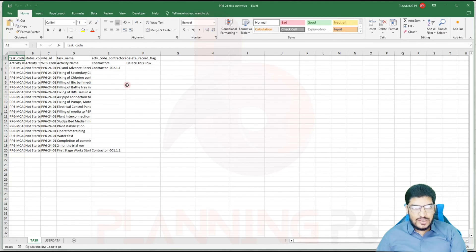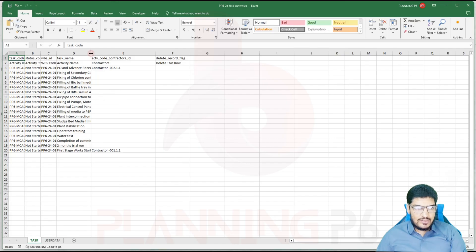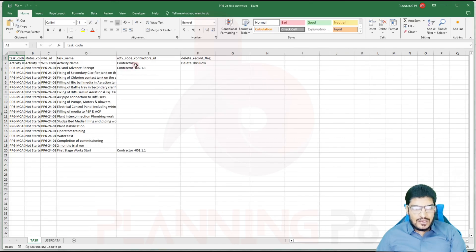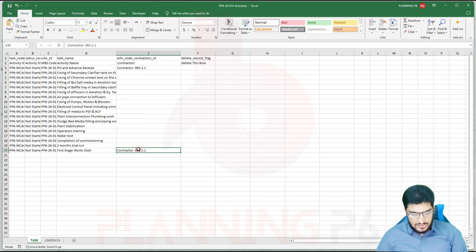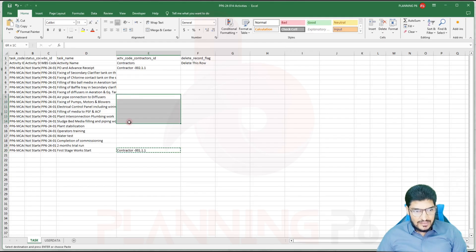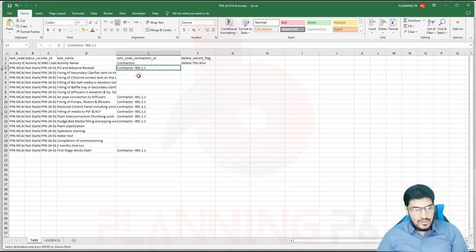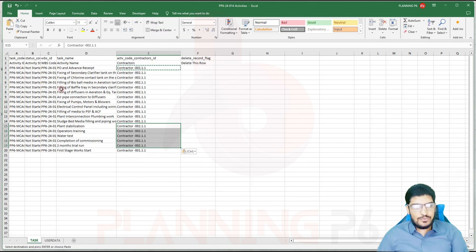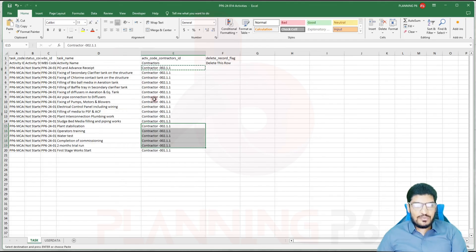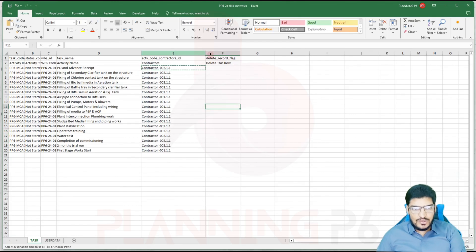Here is our file. You can see the activity codes — two activity codes are there. If you are confused, you have the option to write the complete name as the code value and it will show here. For example, this is 'Contractor One.' If I want to assign this code to some activities, I will do it by copy and paste. If you have too many activities instead of the Fill Down option, you can use this Excel method. If you want to delete any activities, you can. After that we will save and close the file.